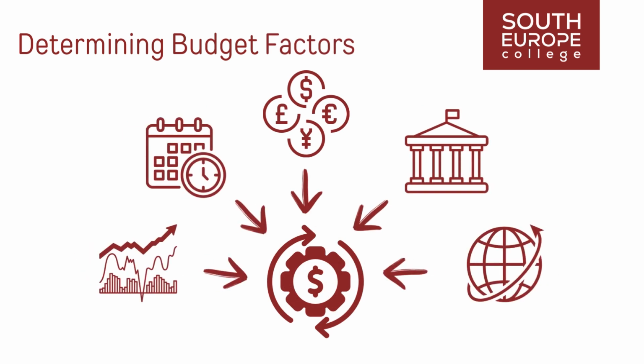Enterprise environmental factors significantly impacting the estimate cost process include exchange rates. In the context of large-scale projects spanning multiple years and involving various currencies, it is essential to comprehend and incorporate currency fluctuations into the determined budget process. Additionally, existing formal and informal cost budgeting-related policies, procedures, and guidelines play a crucial role. These internal organizational factors influence budgeting, providing a framework for consistency and alignment with the overall project objectives.